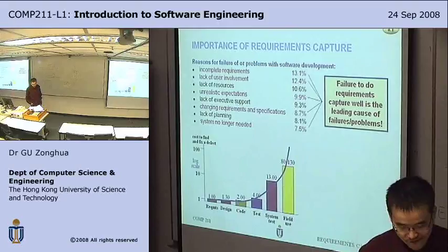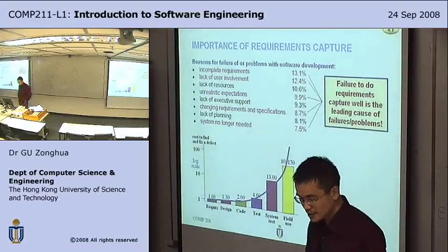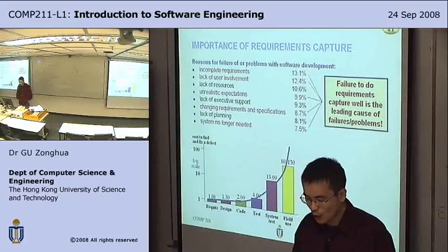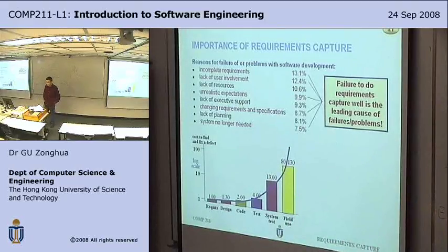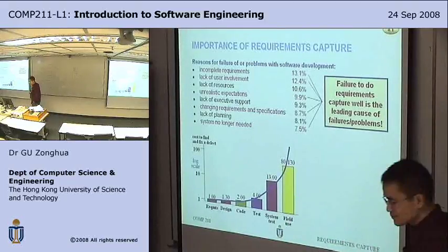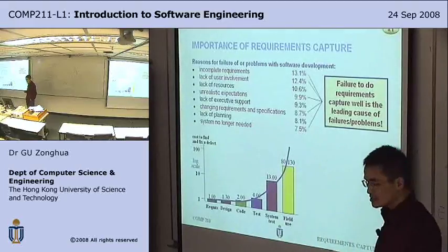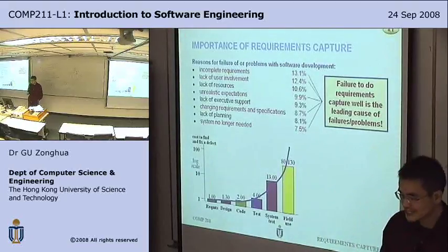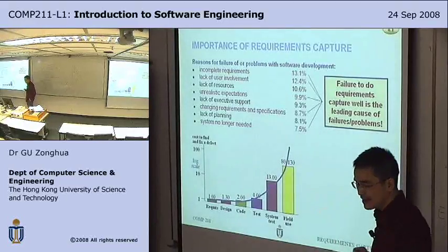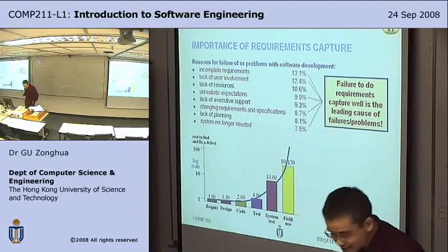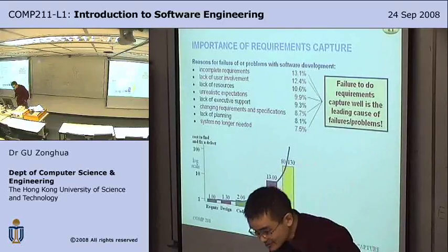Here's the cost to fix a defect. If the baseline is in the requirement stage, if you have a defect in the requirements, to modify the requirements, if that cost is 1 at the baseline, and then design stage you have 1.3, coding stage you have 2, and system test stage you have 13, and in the field use stage you have 80,000.